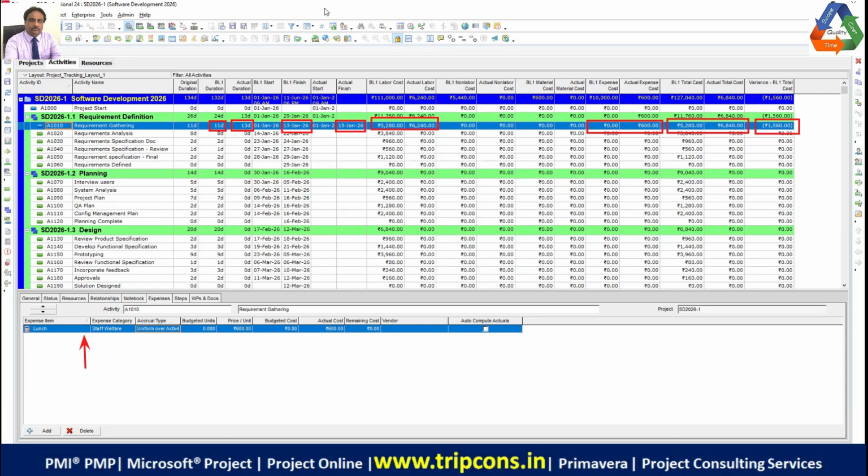Bracket means that that is an extra amount of money spent, right? Instead of writing minus, because if you do 5280 minus 6840, you will get minus 1560 in the calculator, right? But in the financial domain, we don't write minus, we write brackets, right? So that explains that that is an extra expenditure, right? Is that clear, guys?